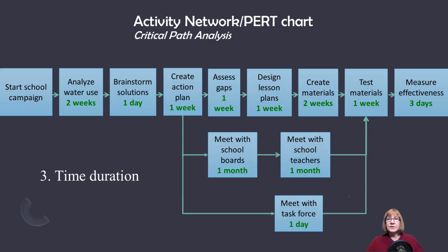The next thing is to identify the time duration. Don't go to hours. The shortest should probably be 1 day, but days, weeks, months, if it really is going to take that long, and you just put that in each one of those.